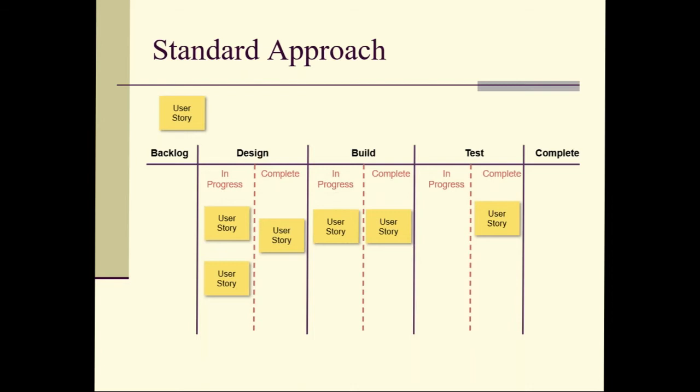I might think that I either have too many designers, right, or not enough builders. This doesn't look like it's in balance yet, right? Also, testing complete. You know, again, with nothing in progress, that tells me that, but there's something for them to work on. There may be a little bit of management supervision needed here to keep them focused on pulling the next piece of work in.